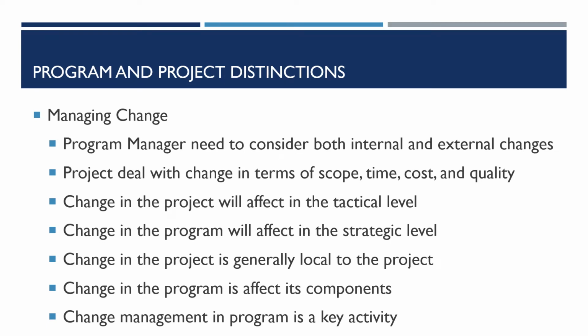The second aspect is managing change. The program manager needs to consider both internal and external changes, right? Program management needs to consider the external, which is strategic, environmental, and business related, and also the internal ones. The project deals with change in terms of scope, time, cost, and quality, right? So change in the project will affect the tactical level. Because of this external nature, change in the program will affect the strategic level because it is linked to the benefits also.